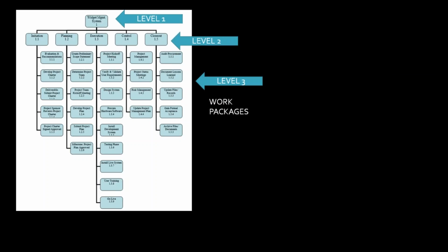But I'm telling you, in the real world, Clark, I've never done a work breakdown structure, so I might fumble and stumble a little bit through the first couple. One of the ways it keeps you in check is your 100% rule: before you go to the next level, you satisfy the level above. Word to the wise. But for the exam, that's what you need to know. That's all they're going to ask you.